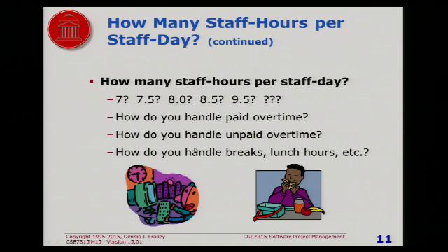The other thing you have to ask yourself is, what about overtime? If somebody works 10 hours, but your normal workday is 8 hours, do you count that as 10 hours or do you count that as 8 hours? Well, what if you don't pay for overtime? Do you still count it the same way? How do you handle lunchtime? Is lunch added to the 8 hours or is it included in the 8 hours or the 10 hours or whatever.